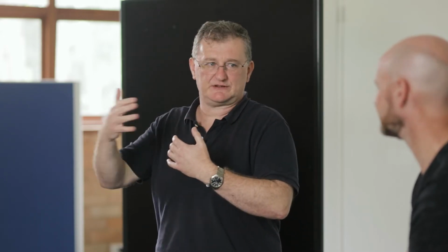And so there's a constant stream of questions that they will have, and I'm serious. It is seriously constant. In an active building process, you're going to have multiple questions every day. Yep. The project managers can field some of that, but actually you don't want them making the decisions, because a lot of the decisions the builders make when they're building, because they'll cut into a wall and go, oh, the frames go that way instead of that way. That wasn't on the plan.